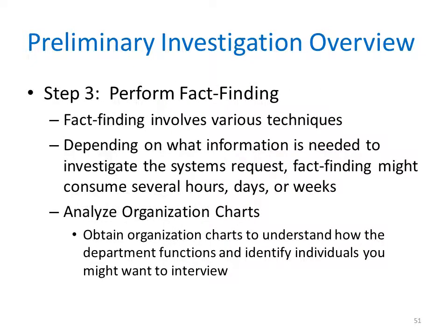Step 3 in this process is to perform fact-finding. The objective of fact-finding is to gather data about project usability, costs, benefits, and schedules. Fact-finding involves various techniques which are described on the next slide. Depending on what information you need to investigate the system's request, fact-finding might consume several hours, maybe days, potentially weeks. For example, a change in a report format or a data entry screen might require a single telephone call or email message to a user, whereas a new inventory system would require a series of interviews.